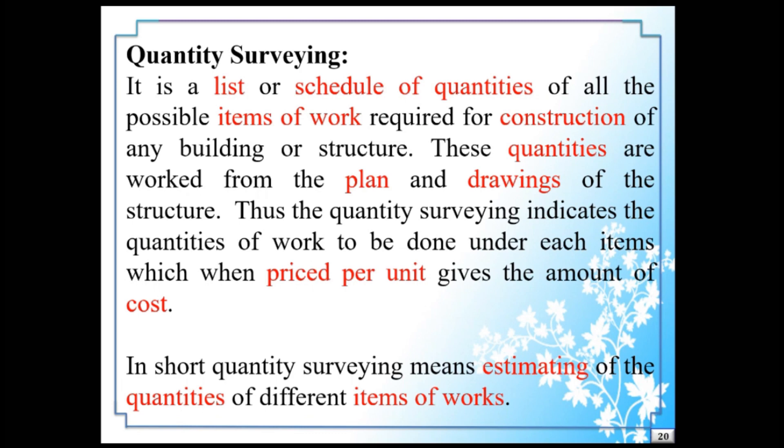Thus, quantity surveying indicates the quantities of work to be done under each item, which when priced per unit gives the total amount of cost.